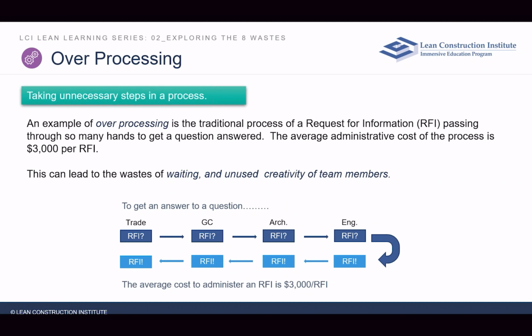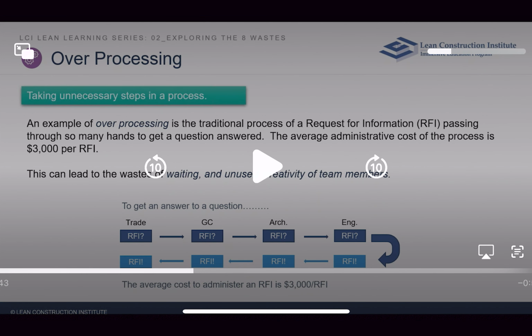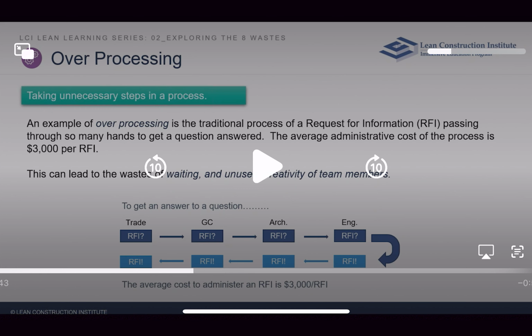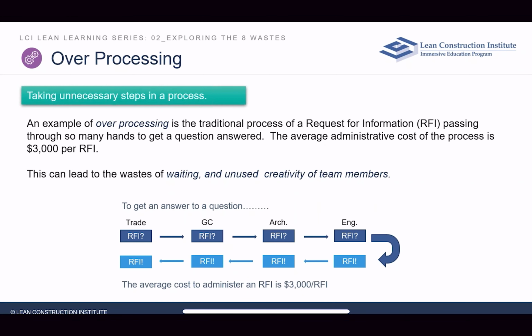So we started to talk about the value of what that review process was doing with the client. The client said, that doesn't bring me value to have all of these great minds thinking about and looking at an invoice of that lesser value. So what we did was we created a threshold. We said the invoice under a certain dollar threshold does not have to be reviewed by XYZ people. So we're able to free up time and energy and not do the step of over processing.